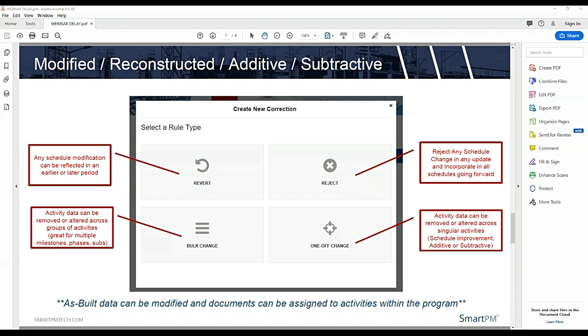If schedules have multiple milestones with LDs associated with them, you can pick and choose which milestones you want to be focused on, and it will do a backwards traverse, and only grab the activities related to that milestone and create its own analysis. So now we can be not just analyzing the job, but we can be analyzing specific points in time or specific milestones and everything that delayed that, which we all know could be different than the true critical path of the job.